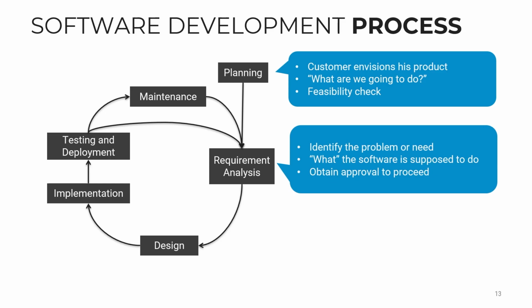In the planning phase, this is the part where you study the idea. You don't have to spend too much time, too much money, too much investment on this. You just think about the idea, and roughly estimate how much we need and how long we need to do this. If it's not feasible, we discard the idea and look for new things to do. But if it is feasible, maybe this would work. The idea is good, nobody has done that before. We can find a joint venture, we can find angels, maybe we can even invest in ourselves. Then we move on to the detailed analysis.